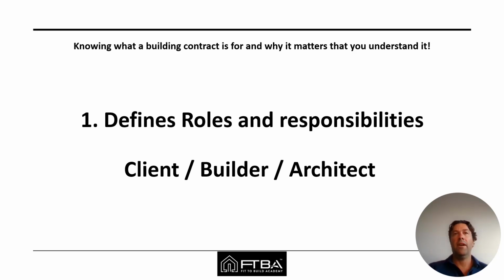In some contracts, however, such as design and construct contracts or projects with a volume or production home builder, many of the above items are completed by the builder themselves. Therefore, the client has a reduced role in the contract and often far less control of the project and how it is delivered. These types of contracts are often the source of heightened issues due to the contracts being written in favour of the builder.